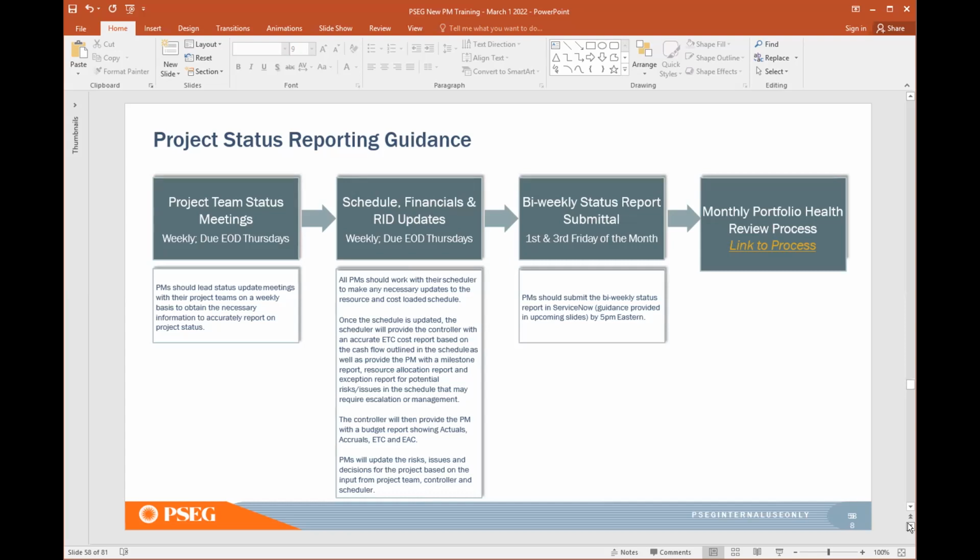So transparency is the key. If a project is yellow and it turns to red, that means that you have done the due diligence, you are monitoring it, and you are giving the right status at the right time. But let's say your project is going green and suddenly you see that you have overrun the budget and you turn it to red suddenly. That is not acceptable, because that means there are some issues that we are trying to hide. So be as transparent as possible.